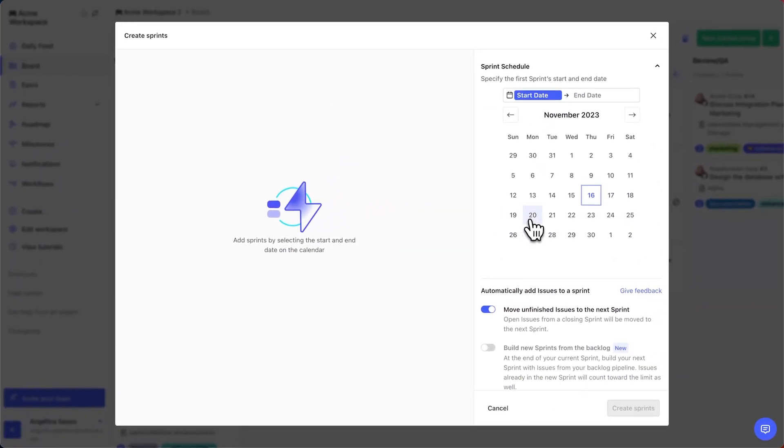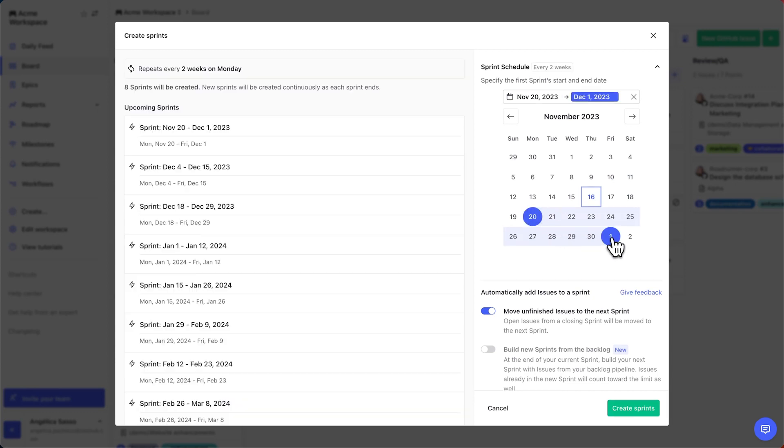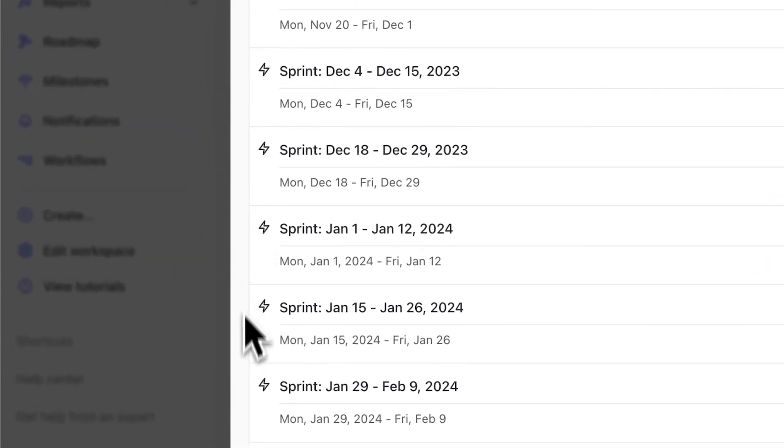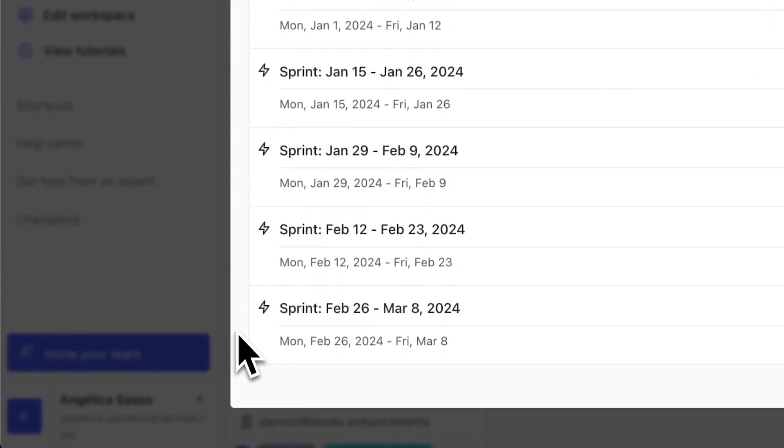Bring up the automated sprint setup window. First, we'll set up our cadence. We'll use two weeks starting on Monday and ending on Friday. Zenhub will automatically create your sprints for you. You'll see the list of sprints on the left.